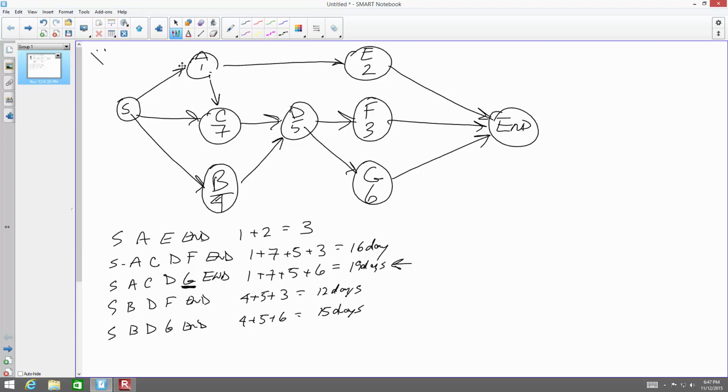Oh, really? So a lot of times, and there are advantages there, because if I design it as a design engineer, I may not know the capability of the contractor that's going to win the work. But if the contractor's in play and we work as a team, then I can design it for the equipment he has, or for the technology he likes, or for the methodologies he likes to build in. So there can be some synergies there to make that work. And typically, most owners see cost savings because of that, which everybody's about saving dollars.